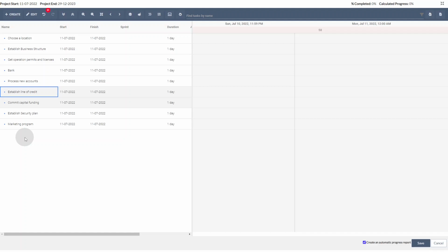The next step is to start creating the WBS structure, or the work breakdown structure. I can do that by selecting subtasks, or the tasks that I want to convert into subtasks, and then right-click my selection. And then I will choose Indent. This will create the structure for summary tasks and subtasks.